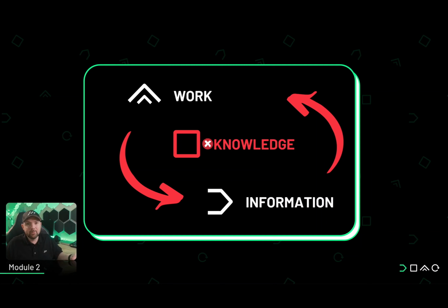Because when people plan out projects, they expect everything works this way, implementing this takes that long, but they don't take into consideration how long it takes to gain information, to collect the information, also including getting quotes from the vendors when they need to buy something.